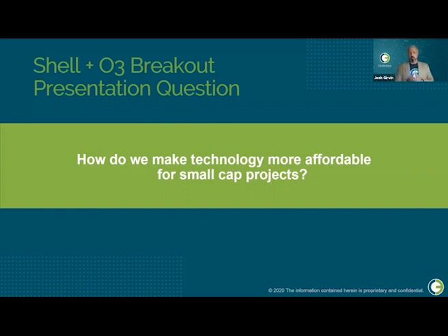So if you're trying to do a $100,000 TIC project, you can't deploy a technology that takes you 12 months to set up and costs you $1 million in configuration. You can't get there from an ROI perspective. But if you can deploy a modern technology that reduces the cost, doesn't require on-site resources for configuration, and can host multiple projects, you've got 50 projects amortizing the cost of that technology. That makes it commercially viable.